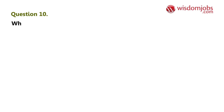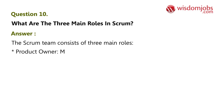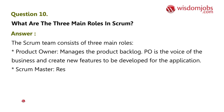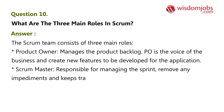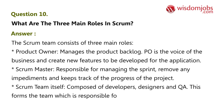Question 10: What are the three main roles in Scrum? Answer: The scrum team consists of three main roles: the Product Owner, who manages the product backlog and is the voice of the business, creating new features to be developed; the Scrum Master, who is responsible for managing the sprint, removing impediments, and tracking progress; and the Scrum Team itself, composed of developers, designers, and others, responsible for delivering high-quality software.